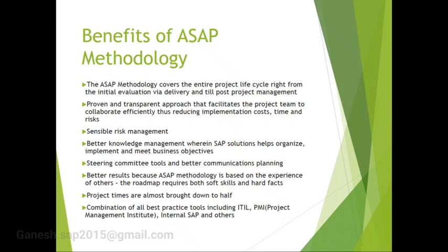The best practice tools we also use, like ITIL and PMI, will be used in this methodology: how documents need to be shared, how they should be stored, what the naming of the documents is, and how to maintain version management of the documents. If you are making any changes, how are you changing the versions, and for that change, what kind of decision drove it? Is it changing from the business, or because of the technical solution? All this we need to capture, which will give you transparency between the customer and the vendor.